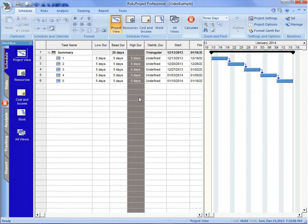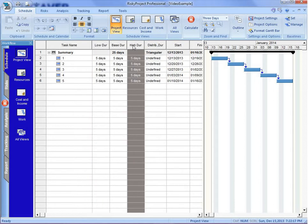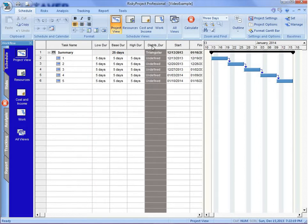Now to quickly make it compatible with the Scheduled Risk Analysis, we're going to have to add a low and a high duration, plus a statistical distribution type.